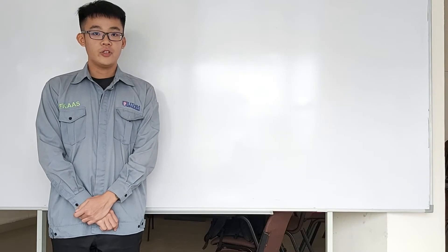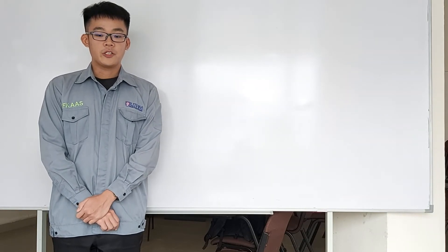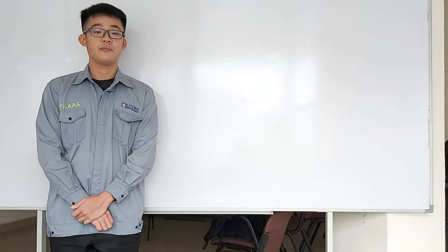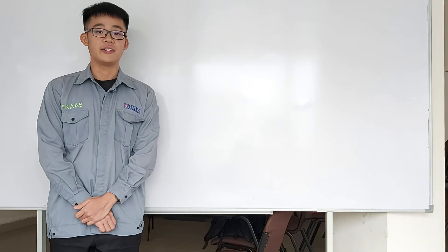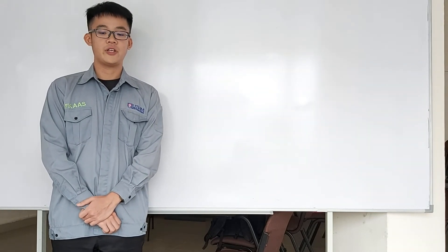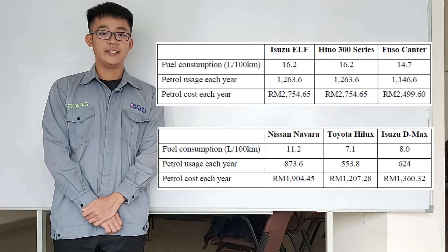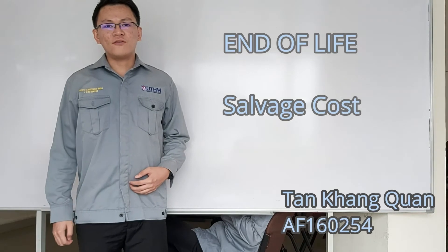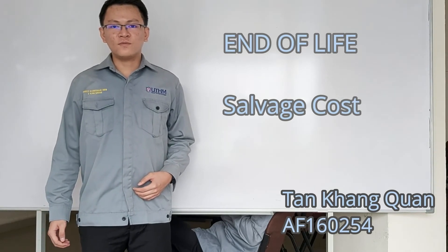For fuel consumption and operation costs, we assume the fuel price remains at RM2.80 per liter for the next five years. We then calculate the petrol costs each year and tabulate them in the table. Service costs were also calculated by referring to actual information obtained from the market.